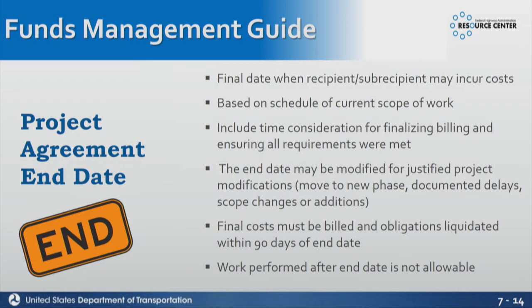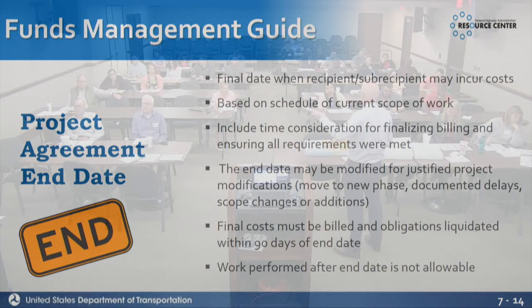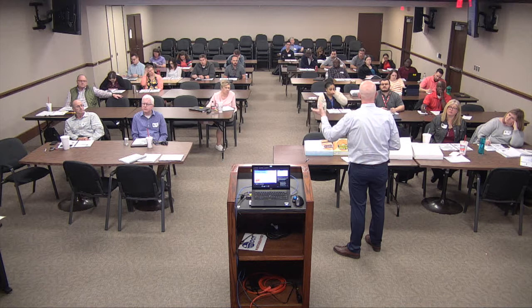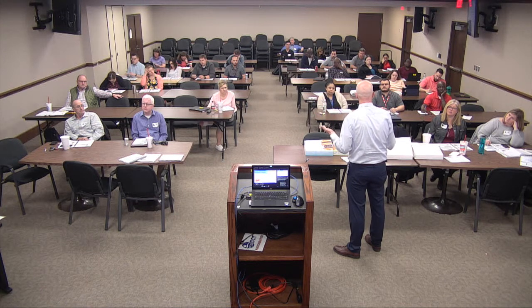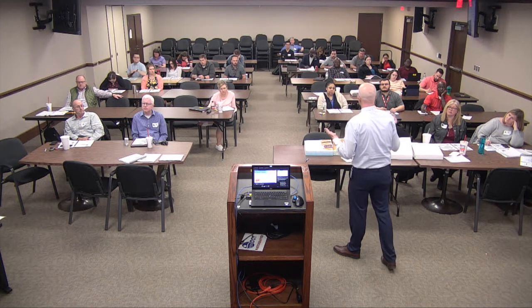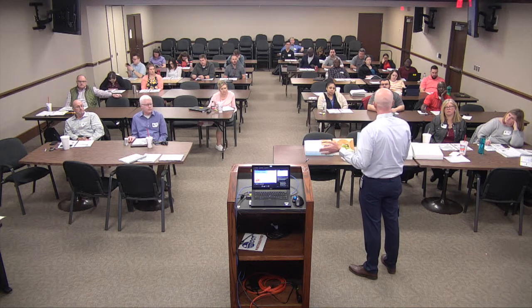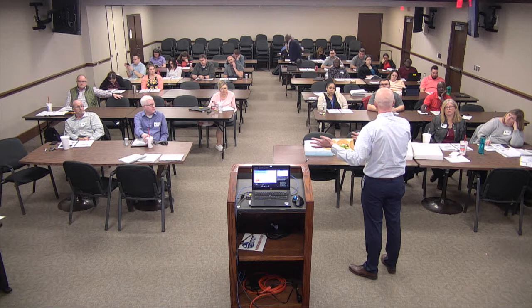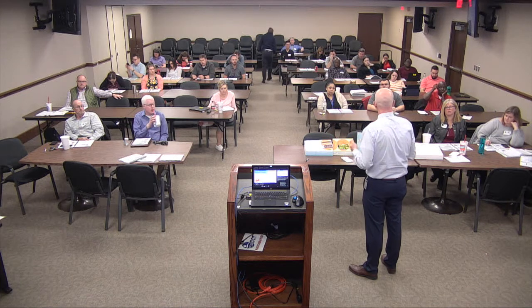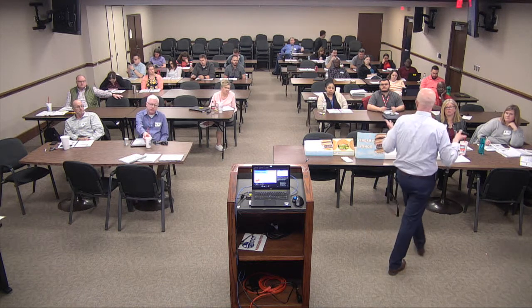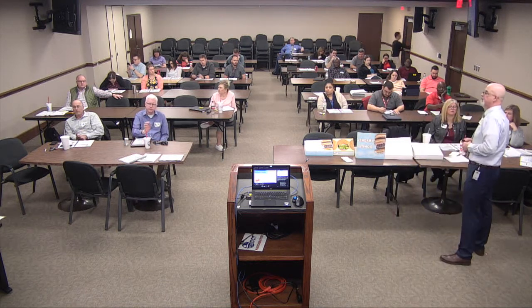Because oftentimes, like auditors, when I was in Nevada, the auditors would actually charge their time to projects. If they were auditing a consultant agreement on a project, they would charge their time to that project, so we had to leave the projects open. Some states, the auditor's work is considered indirect costs, and it's either billed through an indirect cost allocation plan, or maybe you guys just state fund it yourself. And if that's the case, maybe that's not a reason to keep the project open. It all depends.